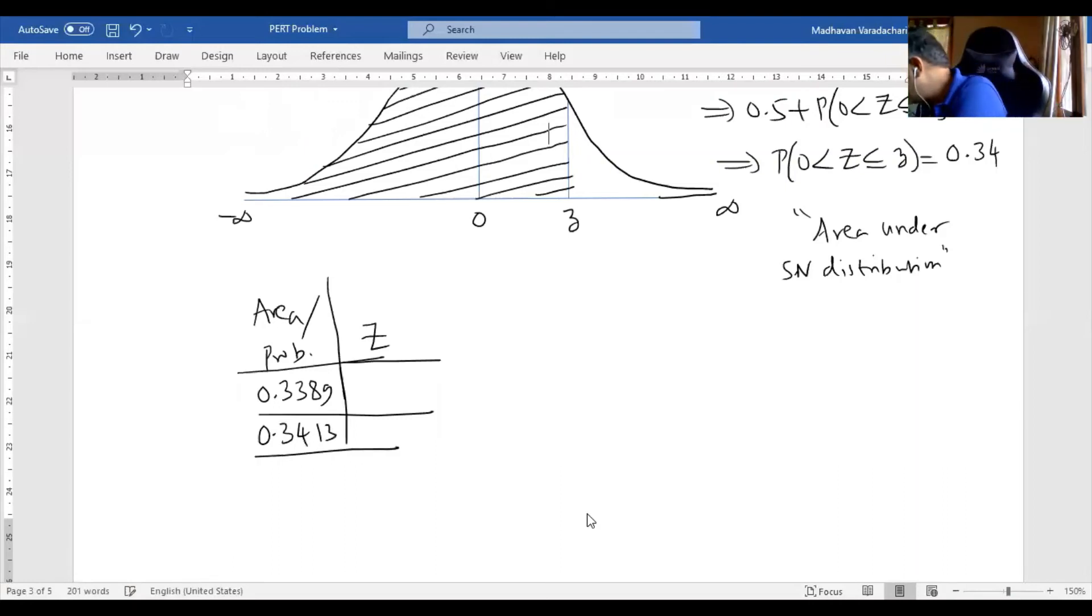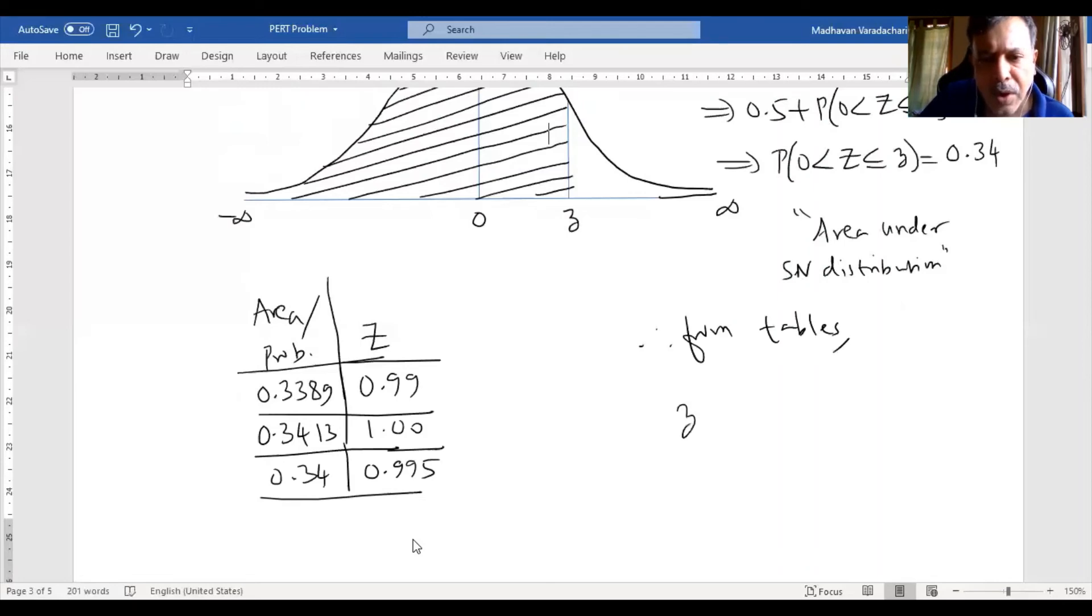The other number is 0.3413. If it is 0.3389, the corresponding z value is 0.99. And this one is 1.00. If I take an average of 0.3389 and 0.3413, I get approximately 0.34. I should take an average of the z values also, which is 0.995. Therefore, from tables, small z value is 0.995.